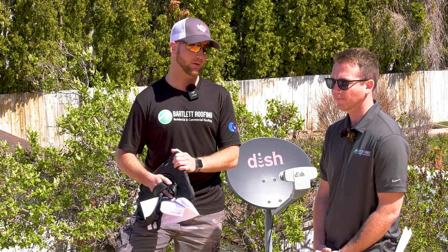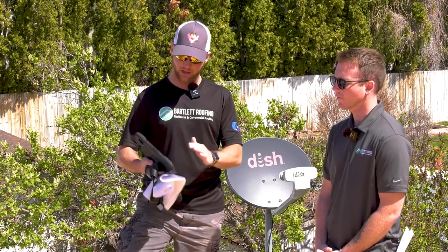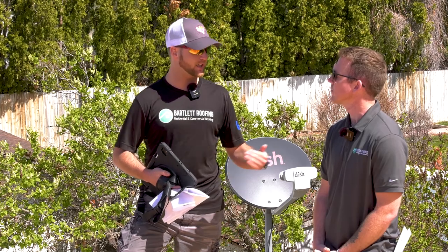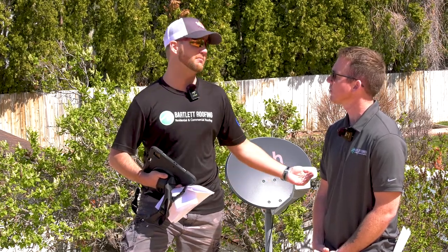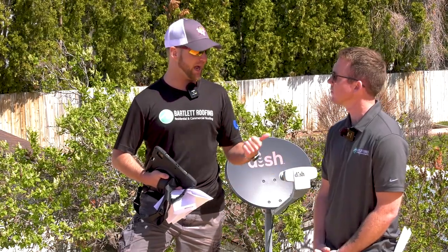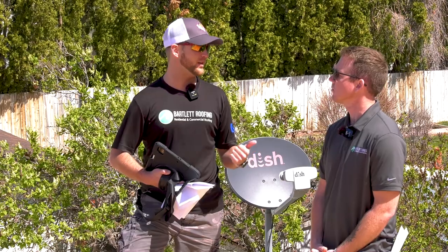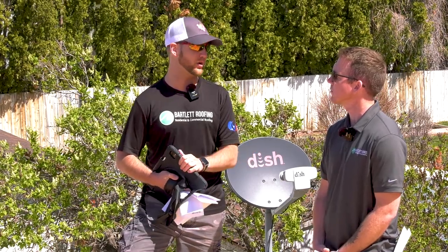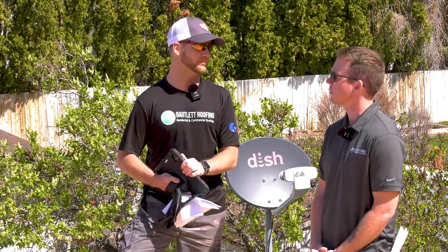With that comes a base sheet that needs to be installed, and then that cap sheet, or commonly called rolled roofing. Okay. When you come across those, same goes, get all the photos you can in your midpoint inspections, just in case on that carrier estimate or Xactimate estimate, sometimes they miss it and just will approve shingles. And base sheet, cap sheet, it's pretty expensive. So if we can get those photos and show that pitch and that we needed to install that up to code, we can go ahead and supplement for that. Cool.